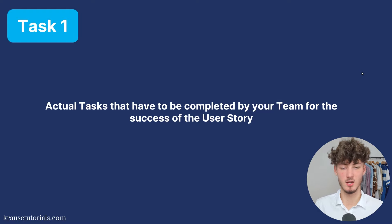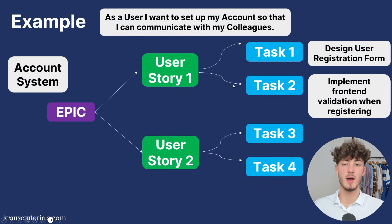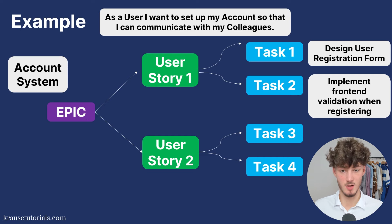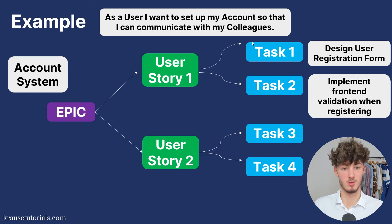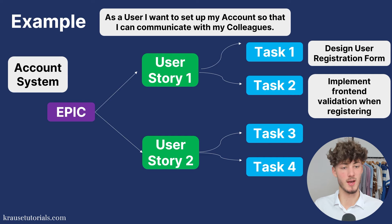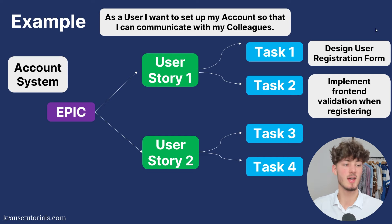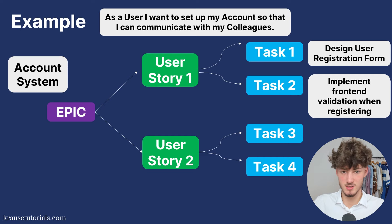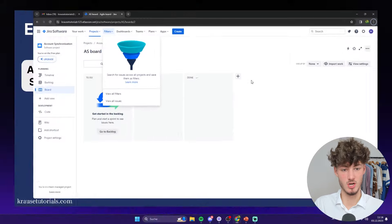As you can see, these user stories don't involve any technical terms like 'I want to code this and that' — because that would be for our third tier in the hierarchy: Tasks. Tasks are the actual tasks that have to be completed by your team, for example your software engineering team. This would be things like 'Integrate Jira with Google,' 'Design the front-end,' 'Set up a database,' and so on — 100% technical. For this video, our epic would be 'Setting up an account system,' and example user stories would be 'As a user I want to set up my account so that I can communicate with my colleagues,' with tasks like 'Design user registration form' and 'Implement front-end validation when registering.'